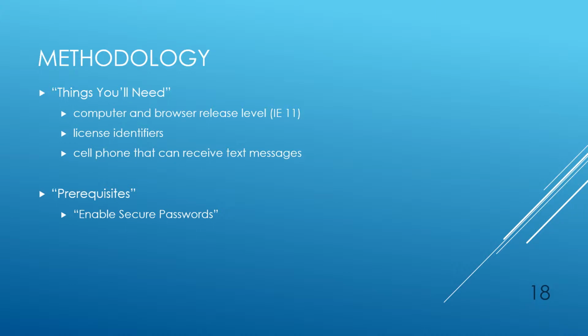The final section on the first page of the setup instructions is titled Prerequisites. It has the user implementer ensure the version of Dentrix is 15.2.239.0 or higher, and it was. Version 16.4.91.0 was installed. It next instructs the implementer to enable secure passwords, a step that I as implementer thought erroneously was unimportant and chose to revisit only if necessary, which it turned out to be exactly that, necessary.